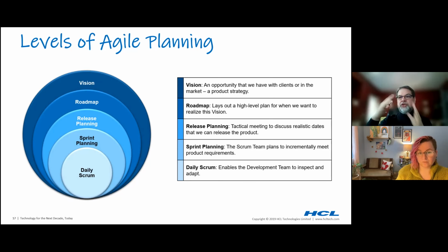So your vision is usually aligned, related to your epic, but the vision can be broader than the epic. It can be 10, 15 years down the road, right? You see yourself doing these things. The roadmap's going to look more at the next year to 2 years, things that you're going to actually be working on in that period of time. And then within that, what are all the releasable chunks of value that you need to perform over that time that supports the roadmap?